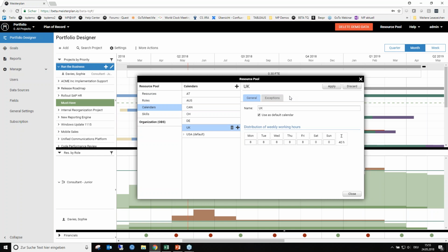So let's take, as I'm working in and living in Germany, the 3rd of October is a bank holiday for us. If I made the German calendar the standard calendar, then in this week with the 3rd of October, an FTE would have only 4 working days. And everyone using a non-standard calendar, like for example the UK one, they would have to work 5 days, and then they would have in that week 1.25 FTE, as one FTE only covers 4 days in that week,